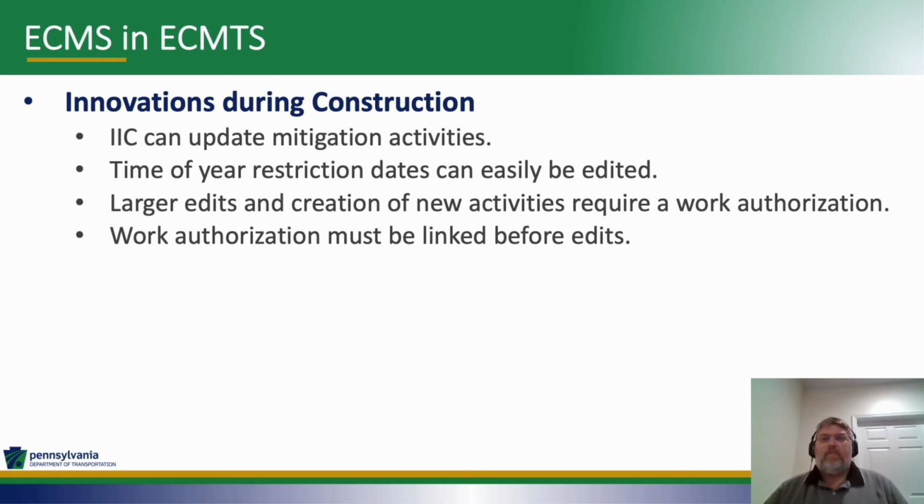And that can happen. We've had situations where earthwork ended up uncovering an unmarked cemetery. So we have to stop the work with the Historical and Museum Commission to develop mitigation. And then at some point when that coordination is finished, we actually have to enter into the mitigation tracking what it is that we agreed to do to deal with the remains that were found in the unmarked cemetery.